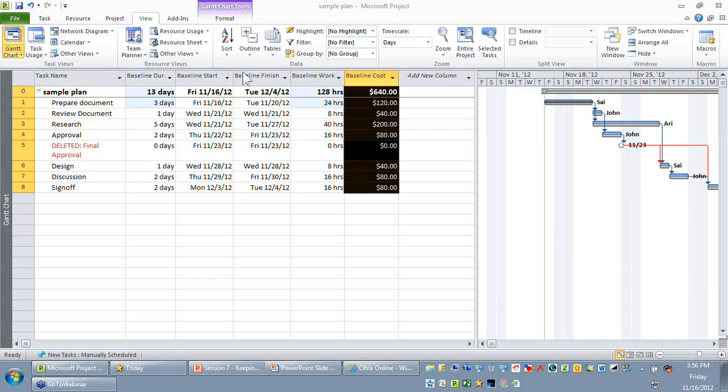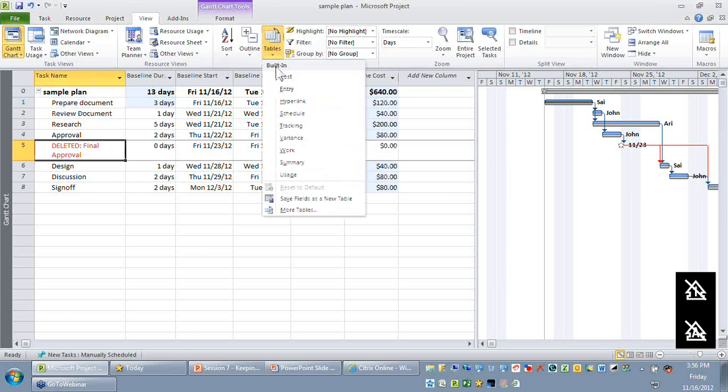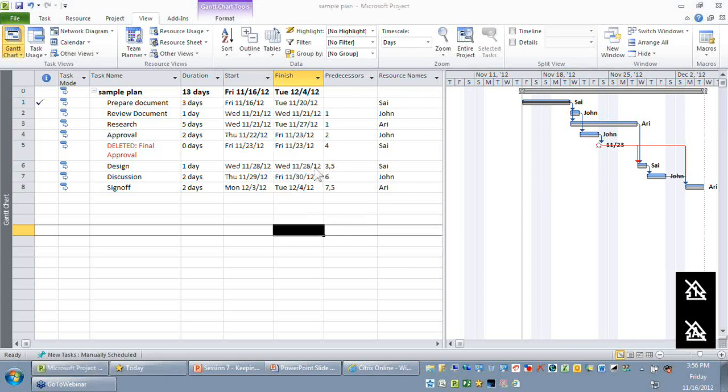Why are we baselining only impacted tasks instead of the full project? Remember, this scenario happens only when you have already started your activities. When some of the initial activities have already started, your entry table will have the revised start date and finish date. So when you baseline the entire project now, your baseline table and your entry table will look alike, and your variance will be 0.